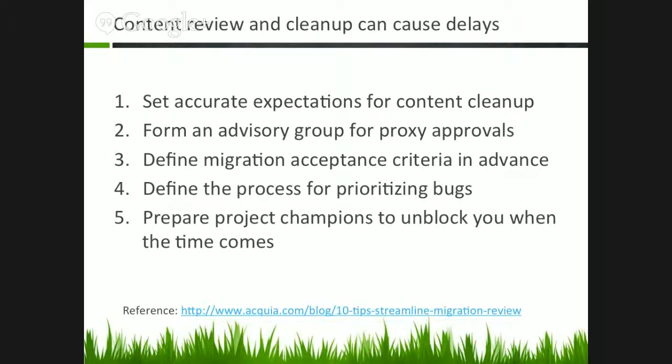We formed an advisory group right at the beginning of the project, and we've used them to gain sort of consensus on a bunch of different decisions. For example, how to handle press releases and speeches, since many components post those. The group came to agreement about how they would be handled. They also defined a migration acceptance criteria so that we had a list of things that the sites had to meet before they launched. For example, everything has to be 508 compliant, all the links on the homepage work, that kind of thing. So we have a formal document that lists all that.